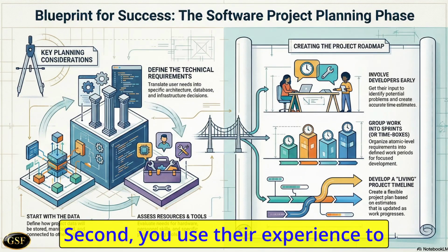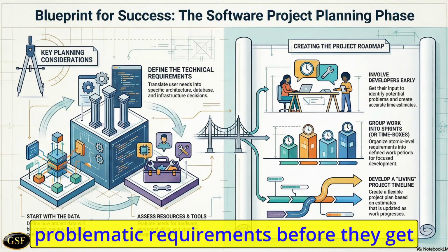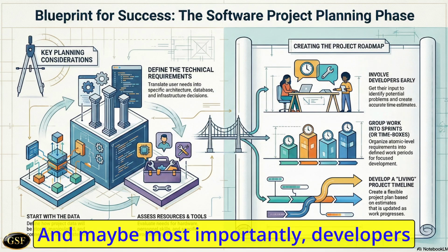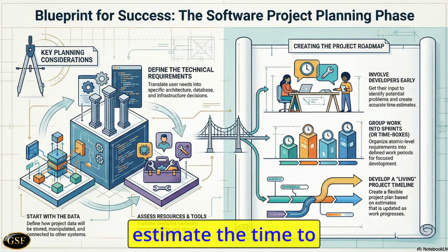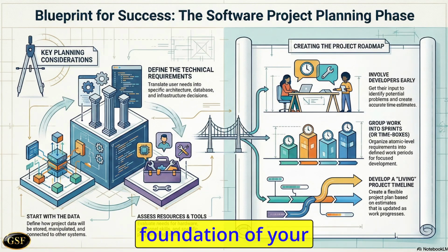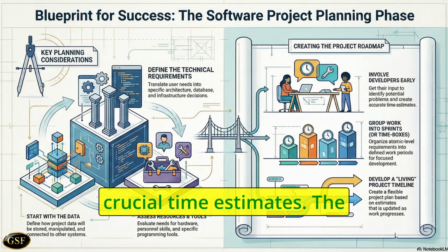Right. Second, you use their experience to hopefully uncover some of those problematic requirements before they get locked into a time box. And maybe most importantly, developers are the ones best suited to accurately estimate the time to complete each requirement. Their estimates are the concrete foundation of your final project timeline.